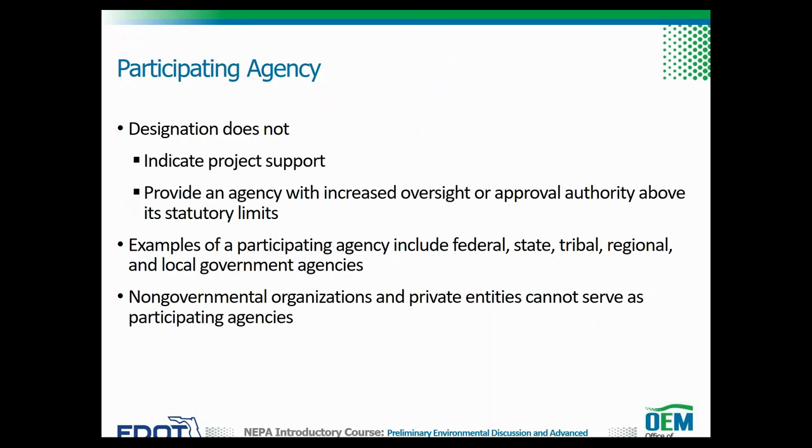Designation as a participating agency does not indicate project support or provide an agency with increased oversight or approval authority above its statutory limits. Participating agencies may include federal, state, tribal, regional, and local government agencies. Non-governmental organizations and private entities cannot serve as participating agencies.